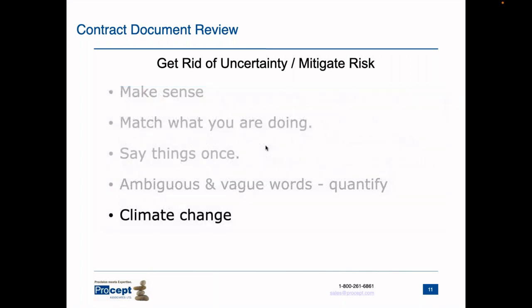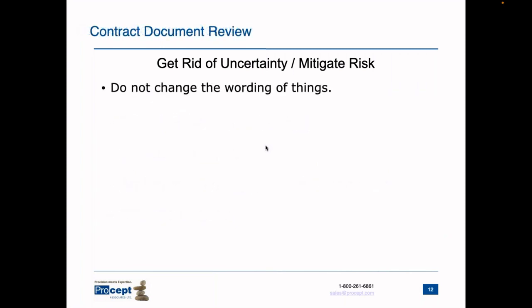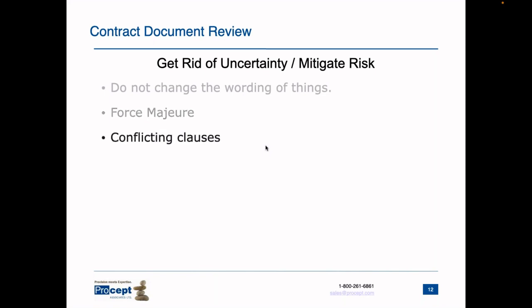Do not use the supposed effects of climate change in your contract, as no one can predict the future. Be careful about wording — you may find a clause that talks about 'weather,' then another talking about 'storms.' Are they the same thing? Look at your force majeure clause: is it suitable for your project and location, and is it clear as to what is and is not covered? Look for any clauses that contradict other clauses, remembering that cut-and-paste may have caused that. Open-ended clauses that pass risk to the contractor mean they'll add a high contingency — and you can't predict the future, so they're essentially guessing, which costs the owner a lot of money.